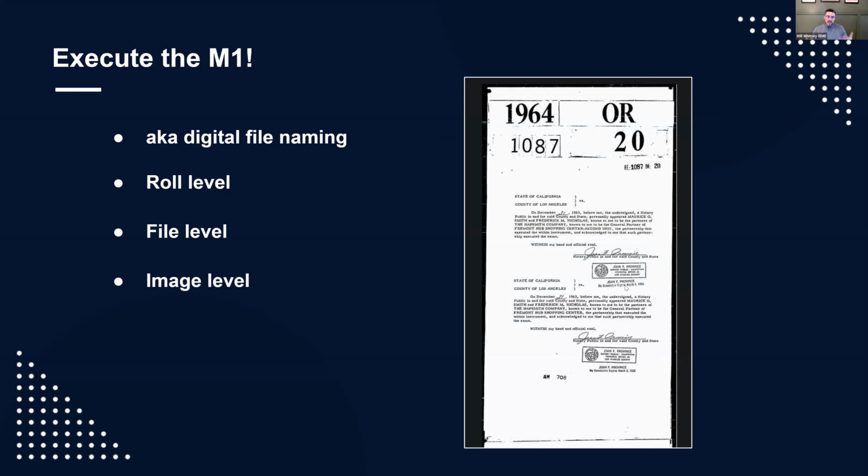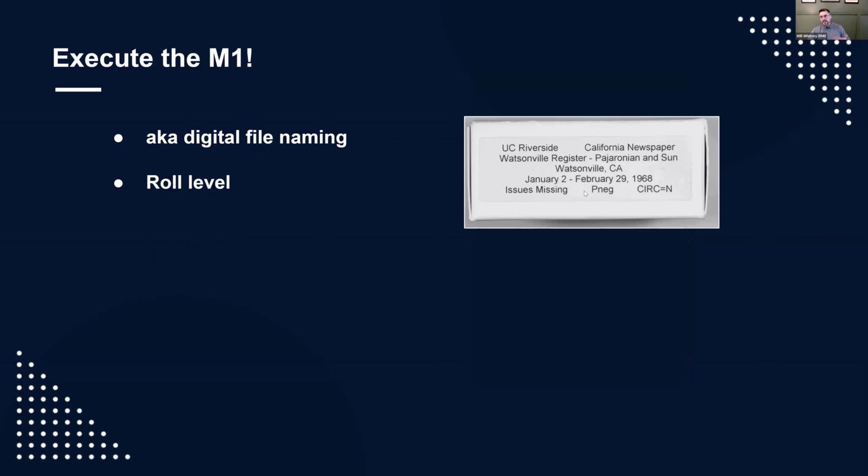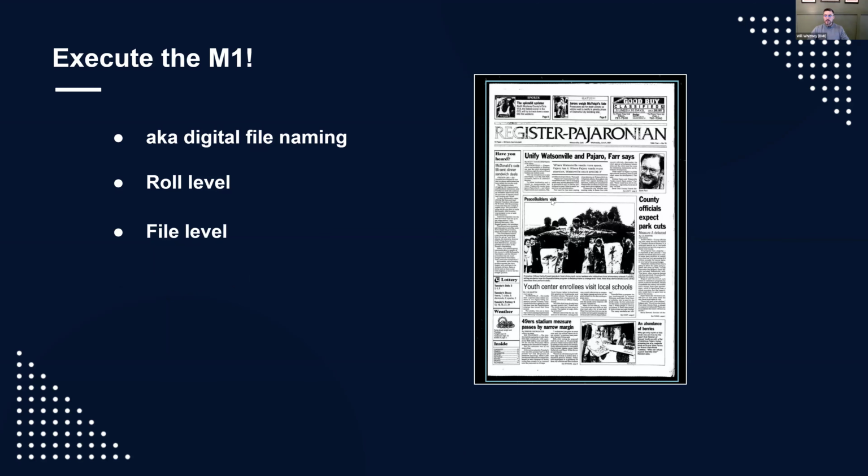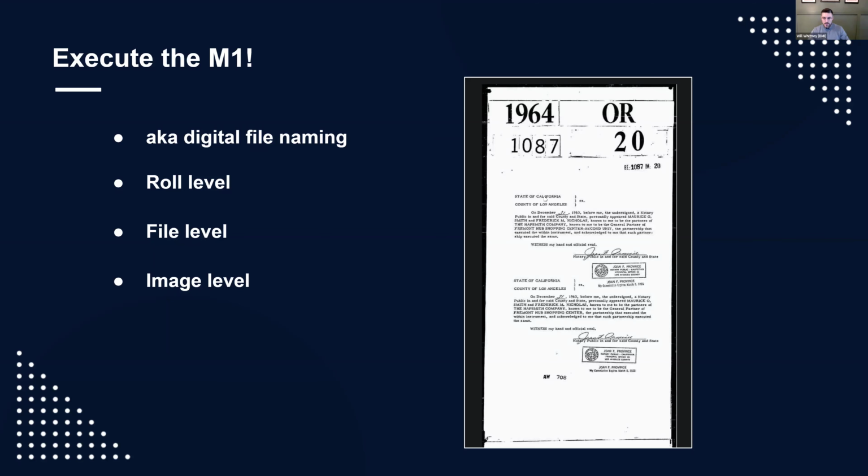Depending on what you're asking for from that original contract, the salesperson would have put that into the scope of the SOP, which would then be applied to the process flow. So our team, Q's people, would know they're not just choosing, yeah, I think this should be roll level. It's going to say you need to capture file level. It's going to be issue date, meaning year, month, day, page, or something like that. It'll be specified what they're going to do. All part of the process flow to create the full project workflow.